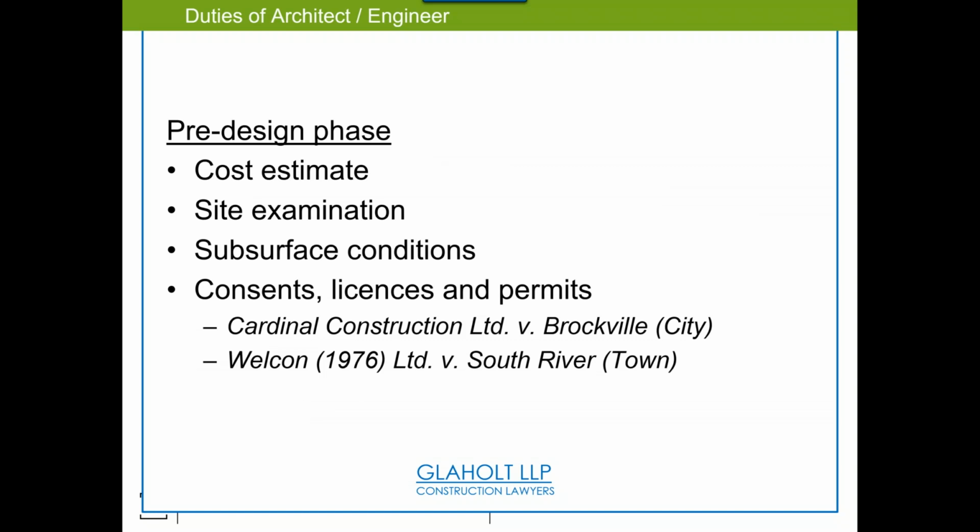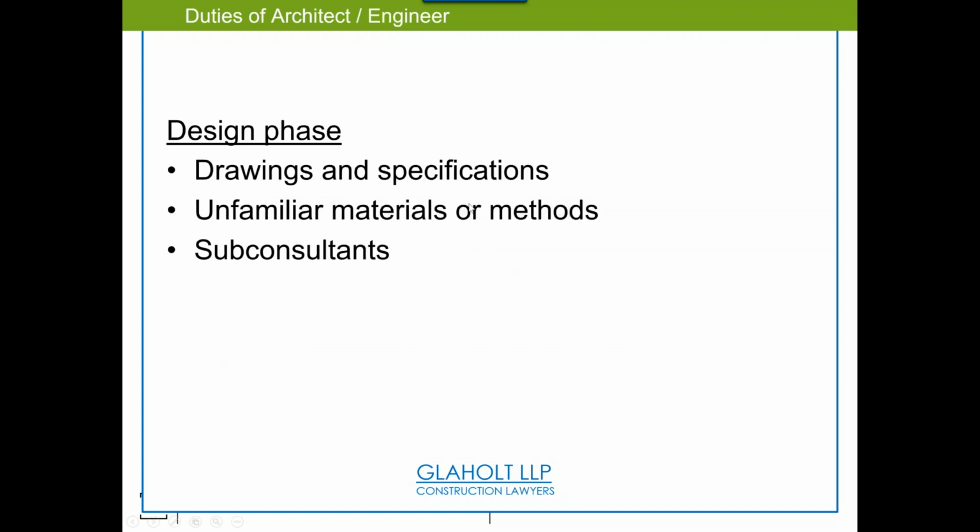During pre-design, the reason why we're so stringent with levels of development is because according to our contracts, we're usually only getting paid per phase, and it's usually in a scaled manner where I get a little bit of money in pre-design and a little more as we go forward. So I want to make sure I'm only exploring in the pre-design phase, and then I'm getting into more design during the design phase.